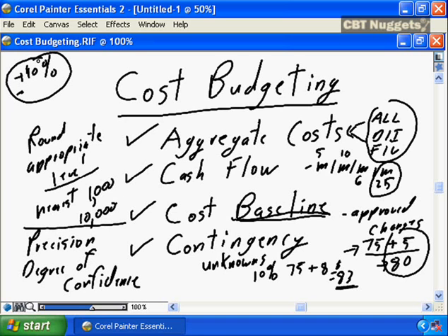If you think back to when we were doing time management, a rolling wave, that I have detailed estimates for each and every element of my project, or is this a plus or minus 50%, that this is an initial project budget, I only have detailed estimates for the next phase of my project, which is the first of 5 phases, and I have summary level estimates for the remaining phases of my project.